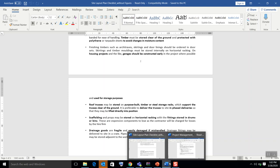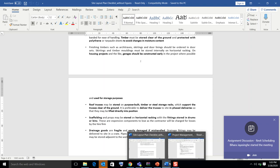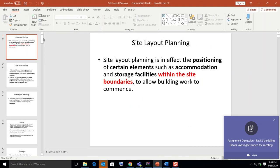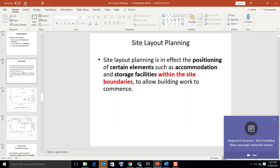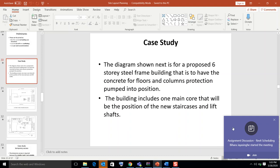Access to stores should be clear and wide, more so than access to accommodation, because you need to handle bulk storage. Vehicles carrying long items such as 12-metre reinforcement bars cannot easily manoeuvre within the premises, so that needs to be considered in your design. This presentation is a sample Indonesia case study presentation.